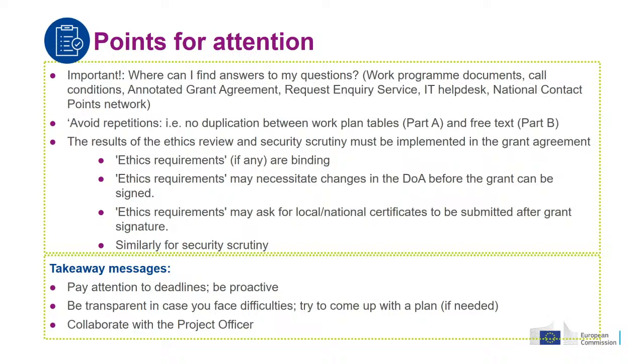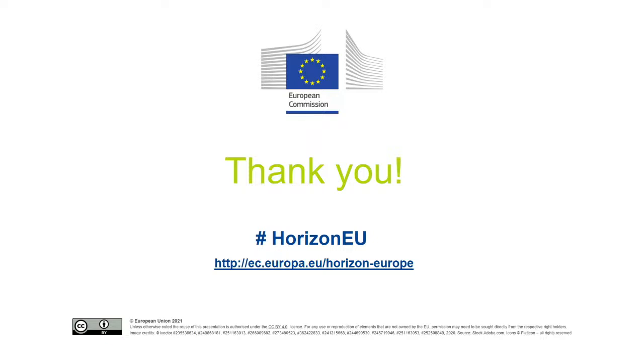Now, when you prepare the grant agreement, avoid repetition, so do not duplicate data between different tables and the narrative part. You should know that ethics and security requirements are obligatory, so you should comply. You should accept that a new task could be added to your deliverables. You should make the changes if you are asked by the experts reviewing the ethics or security. Also, please pay attention to deadlines and be reactive. Do not hesitate to ask if you need something, but try to provide feedback as soon as possible. In case you find problems, be transparent and try to propose counter solutions. The project officer is there to collaborate with you, so you should always contact them. So that's it. Thank you for your attention, and we can now go to the questions.